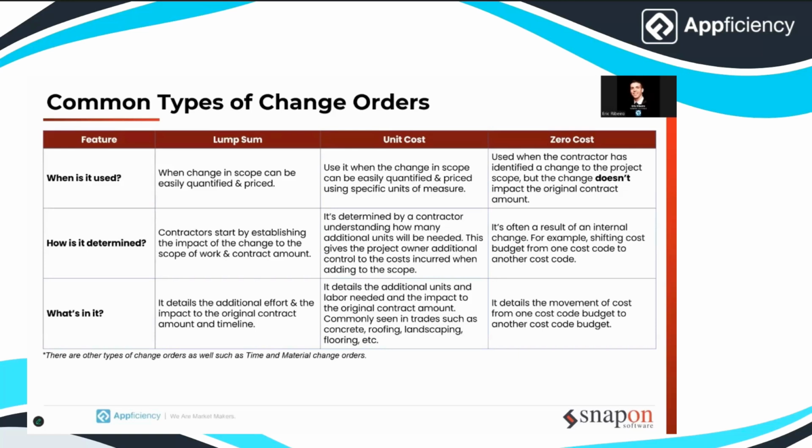But these change orders can be beneficial because they offer flexibility and can be processed pretty quickly, right? Especially for urgent or unexpected work. But like all change orders, you still need to establish the rates in writing and ensure you're capturing all the associated costs accurately. So when we think about time tracking, material receipts, expense reports, things of that nature, ultimately there's a level of transparency that both parties will be happy with.